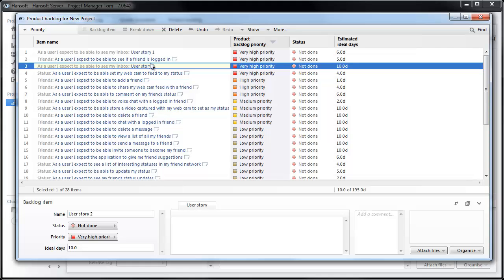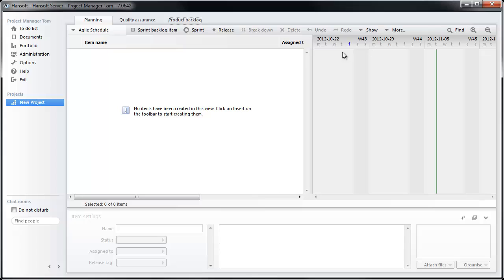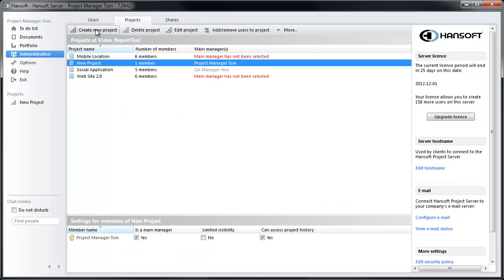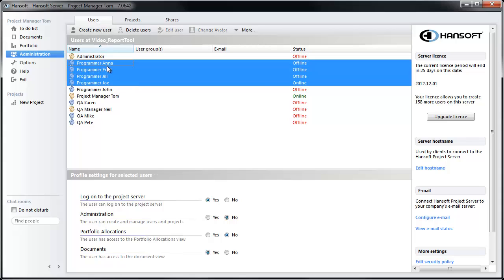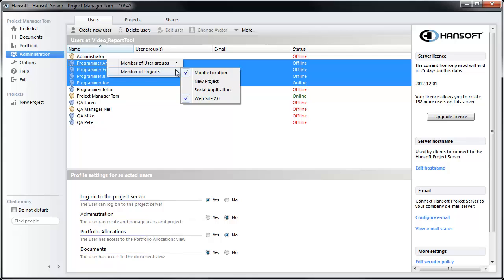So now we're done and we're going to start working with this. I'm going to close down the backlog here and move into the project schedule. We need some team members to work on this project. So I'm going to move back into administration, go into the user tab and select these four programmers and add them to our new project.